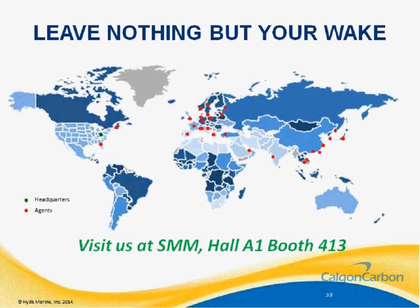During the installations and startups, one of the things that we have observed a number of times is that often the yards and the installation contractors don't adequately consider line flushing in advance of starting up systems. We have altered our installation and commissioning checklists accordingly, but one thing that's very important, because we've had experience where we've seen boards and wrenches and scaffold clips and other sundry objects inside of our ballast water treatment systems during startup after installation or repair periods. So that's a very critical thing to do, and to make sure that the lines are properly flushed prior to startup and certainly prior to installation of our UV lamps.